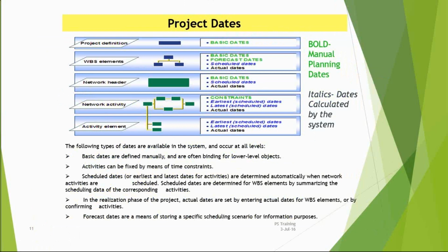What is the float I'm having between early start and late start? What time can I delay my activity? What is the maximum time I can delay my activity so that ultimately my project phase will get finished at my estimated time, so that it will not affect further tasks? It will help us determine the critical path.